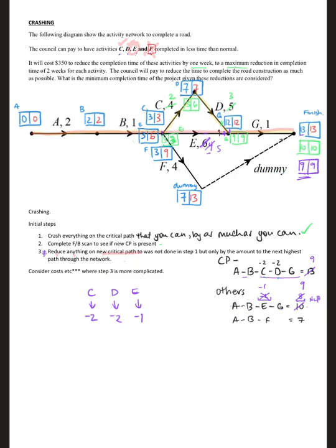If colours work for you, use colours if that's easier. I do recommend writing down your path through the network. The reason why I never touched F, because it was nowhere near becoming ever close to like A, D, G, it was so much lower, so it was never going to be in the ballpark. That's a good way of reducing your time doing these as well.